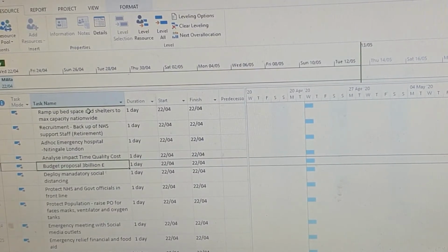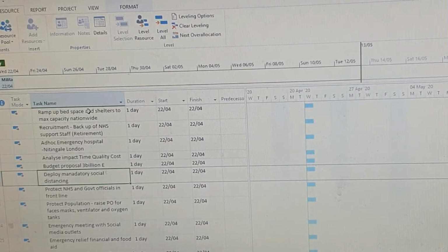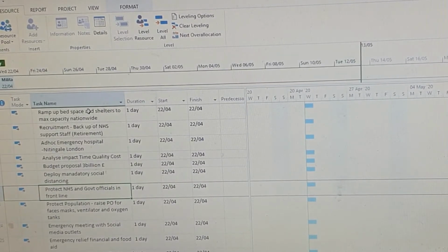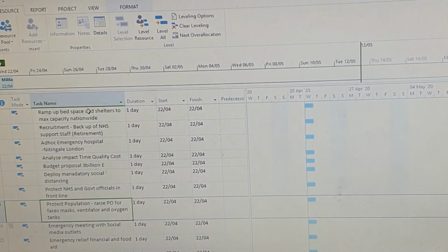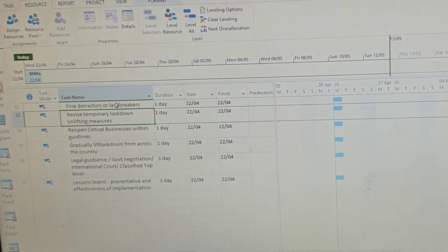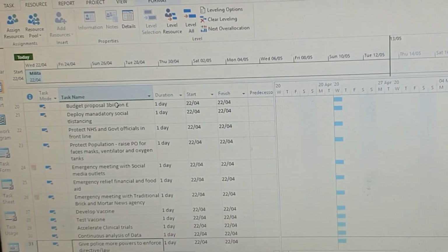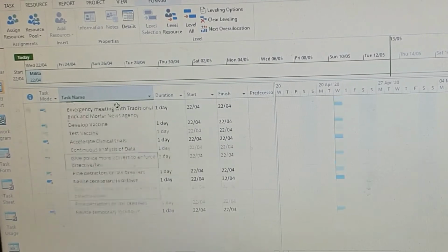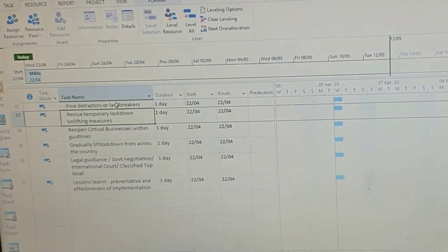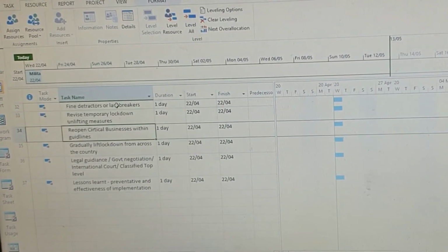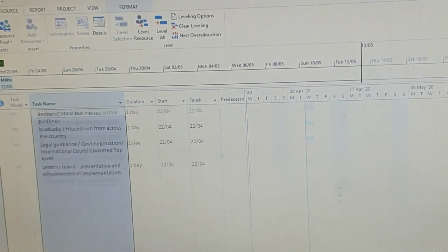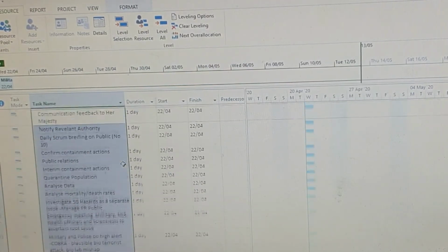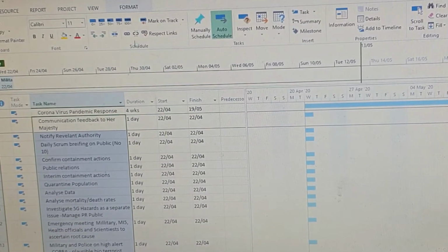So going through each of the subtasks that has been listed down, and making sure that they are in the right order is absolutely crucial. Due to time constraints, I can't cover everything, but item 37 is your last task, and if that's a milestone, in the predecessor column for item 37 you can affix the number 36, and 0 days in the duration, and that will set your milestone. Like I said, these listings are hypothetical. Doesn't mean that it's going to be like this in real time. It could be totally different. So this is basically just for illustration purposes.